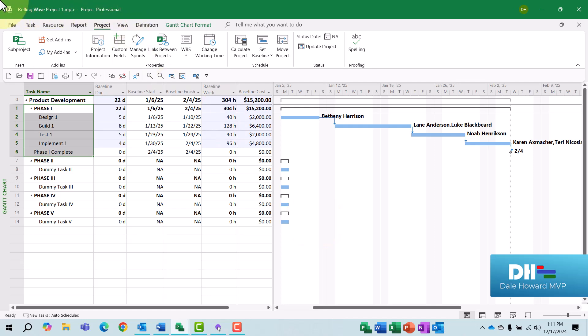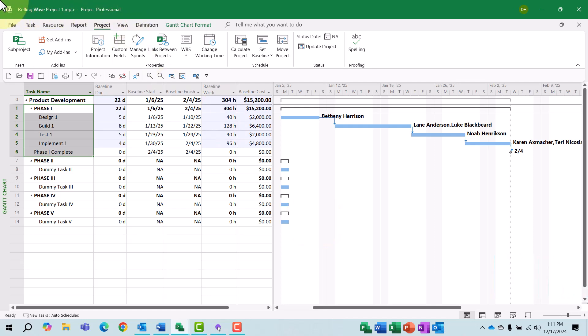But in the bottom of the dialog, I'll choose the option Selected Tasks and I'll select the checkbox To All Summary Tasks, which will roll up this information to row 0. When I click the OK button, notice now that all of the tasks in Phase 1 are baselined. At this point, I'm ready to begin entering progress in Phase 1 and then to begin completely planning the Phase 2 section of the project.